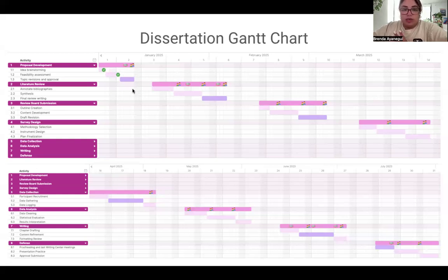You will also see that between each of these stages, I did keep some buffer time just in case there are any revisions or when I'm working with third parties, anything that wasn't finalized that I can't control. Make sure that my schedule is really not altered by that.